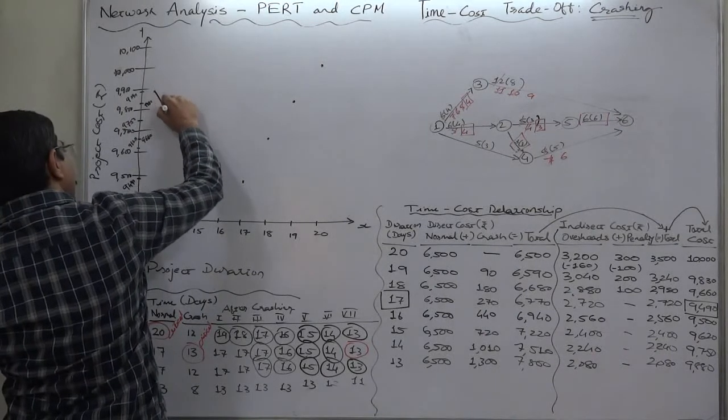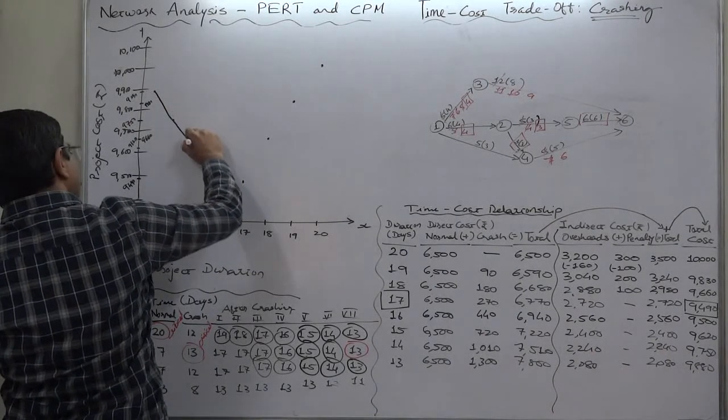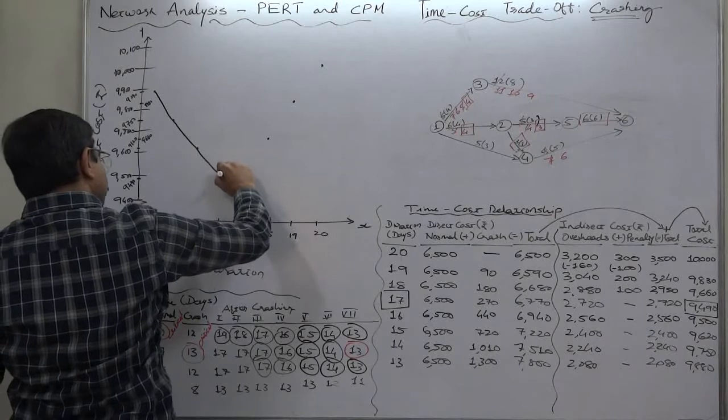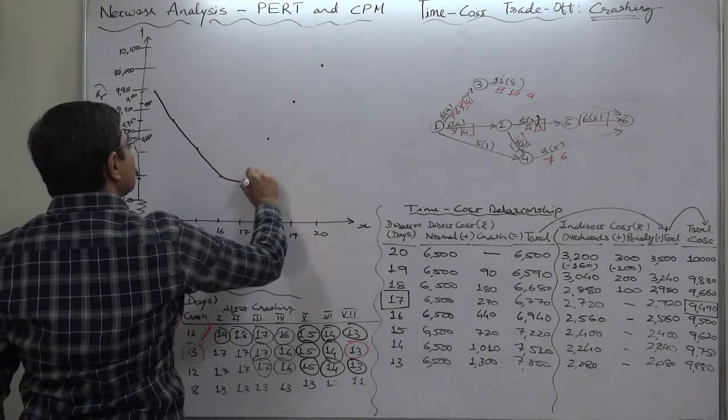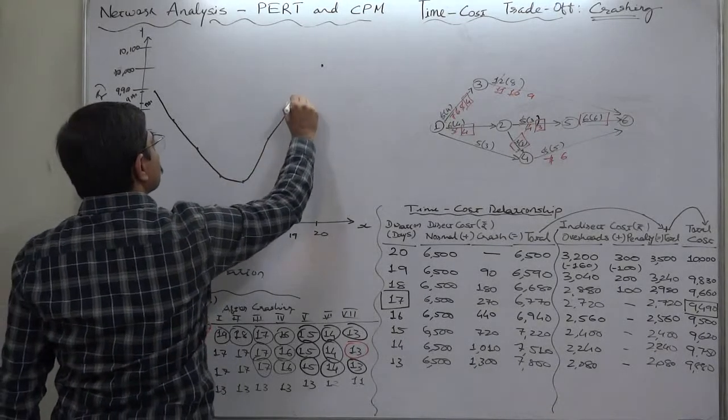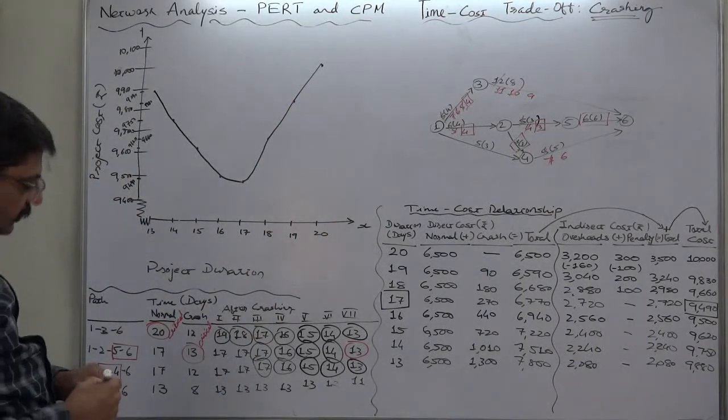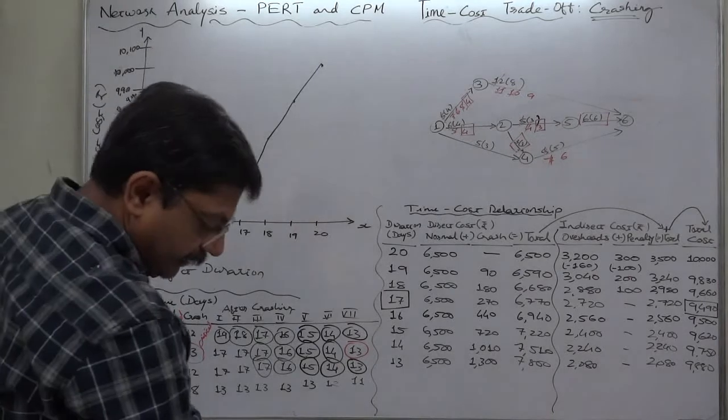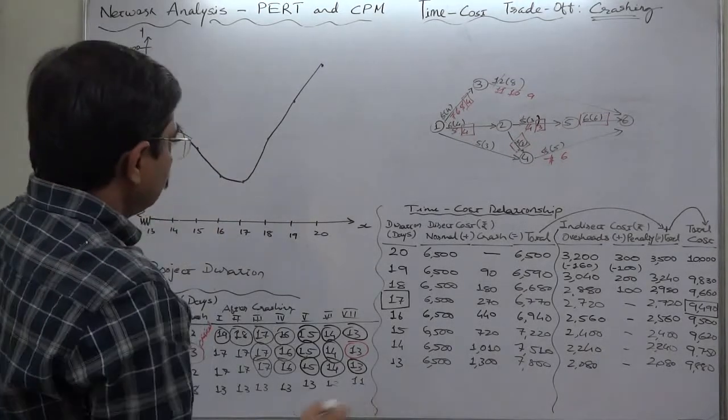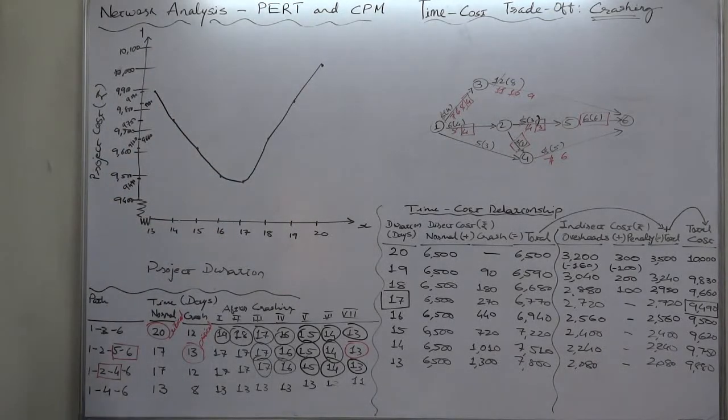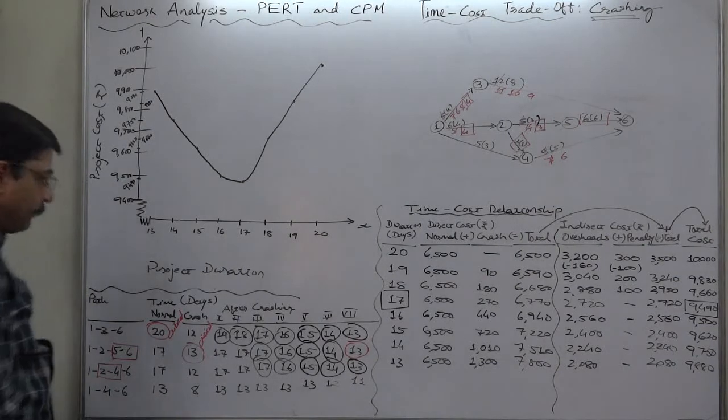Let's connect the points and try to have a curve. This is the curve showing the relationship between duration of the project and project cost, that means time cost relationship.